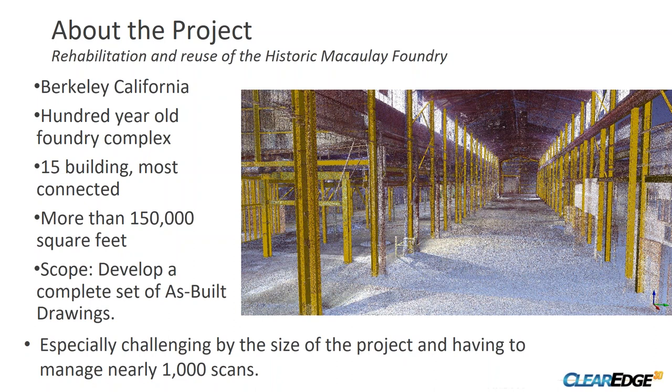We spent about 6 weeks working on the scans, and we were able to effectively produce the entire project covered. We used the Faro X330 scanner to do this. We set it on 4x quality. It was taking about eight minutes to do a scan. In hindsight, I would have taken more time on the scans and taken up to 11 minutes to do them. And I probably would have done a few more just to make sure that we were actually able to capture all of the details as necessary.